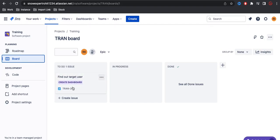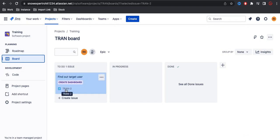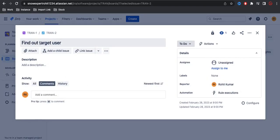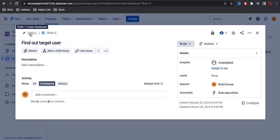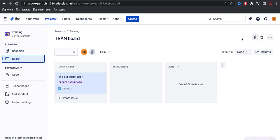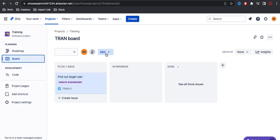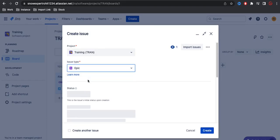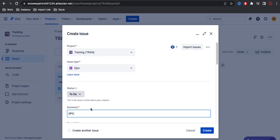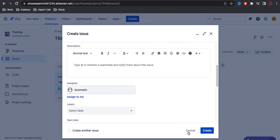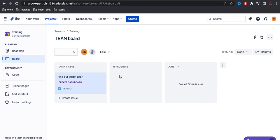Under the issues I have a task called 'find out targeting'. Under this task it is showing Train1, which is an epic. When you create an epic, the epic will not show under the board. You can create your own epic — let's say Epic 1 — and those epics will not be shown on the board. You can see all these epics are created but they are not showing there.